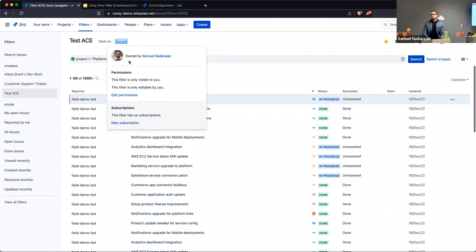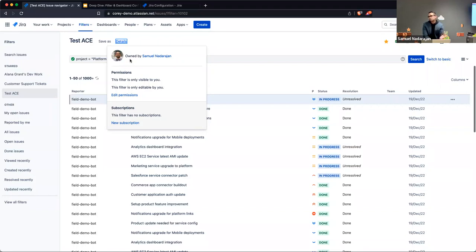Let's say someone leaves your place of work and someone else needs the information that filter returns — a Jira administrator can go in and change the owner. That can save you from having to reconfigure boards from scratch or redo dashboards. By default, ownership will default to whoever created the filter.